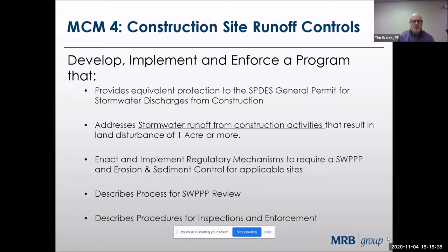And that threshold can change based on local law for municipalities. In the city of Saratoga Springs, they established a local law that non-residential projects of 1/10 of an acre or more had to do SWIP and were regulated as such.